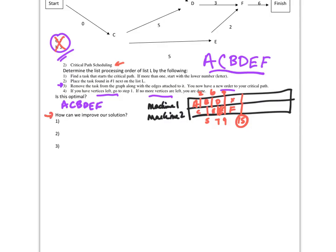So I ask the question here, how can we improve our solution? Well, we can't, because we did get the optimal critical path that we're dealing with. But sometimes, like I said, we don't. Well, but if we're trying to be efficient, be a company, make this better, what might you do to improve our solution? Well, there are some definite ways to do this. Think about it for a minute. But what I could do is reduce time on tasks. So I'm thinking that this one might be inefficient, so I might want to reduce that. Does that help me in my critical path analysis here? Maybe, maybe not. You could reduce one, and sometimes you reduce times, and it increases the amount of scheduling that you do have, which seems weird. However, you just end up with more gaps in how you do that. So we can reduce task time.